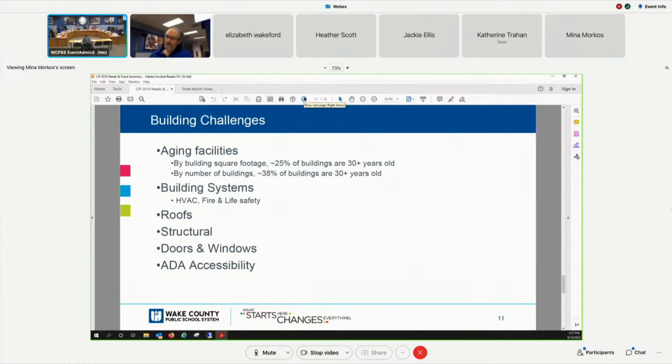Just for clarification on the grandfathering, is the grandfathering when the permits are approved or when construction is completed? As soon as the permits are approved, that approval comes with the understanding that you have to update your restrooms, your entrances, the key components of the building where visitors, staff or students might need access. You must update them.